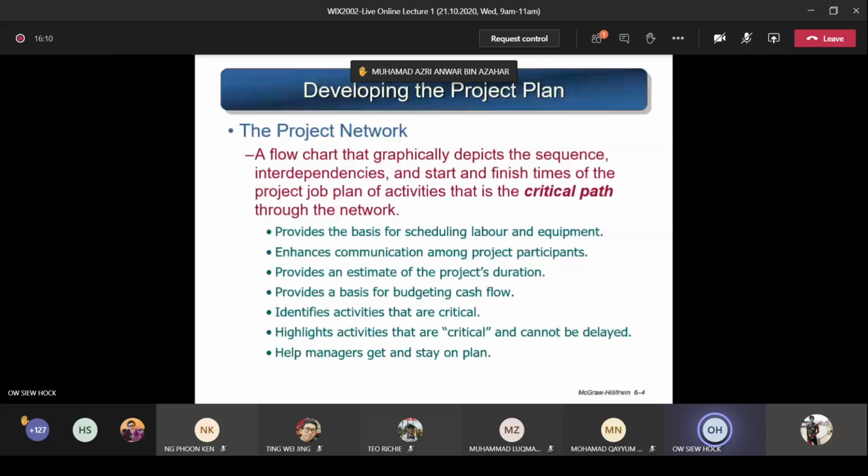Okay, so now you can draw. Just now I mentioned that the WBS for the circuit board involves design, production, test, and software. So how do we draw this in a network diagram? This is the activity network for the circuit board work packages. You can see the arrows show the interdependencies, which activity comes first and which is followed by which. Here, A represents D11, D12. So you can see this is WP D11, D12.